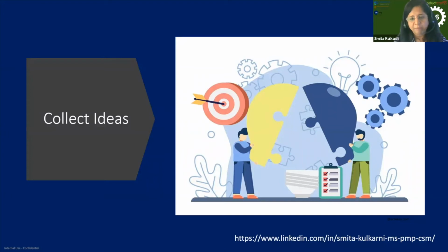And we gave a thought: is the customer engagement there? We collected all the customers, all SMEs, all the engineering team, the management team in one room and asked them to write just 3 initial features that they want to see in this product.